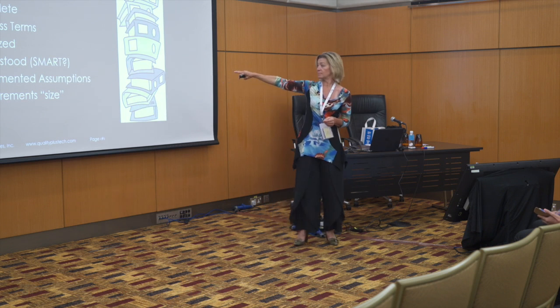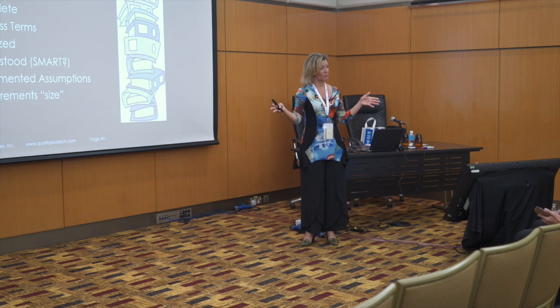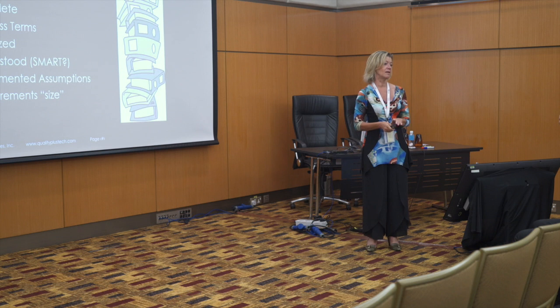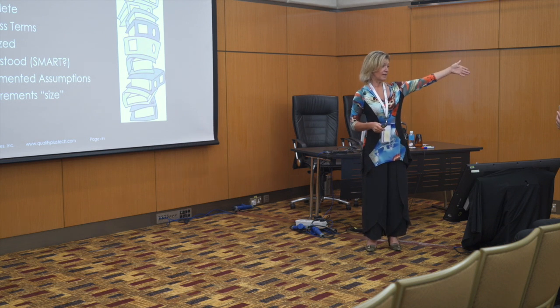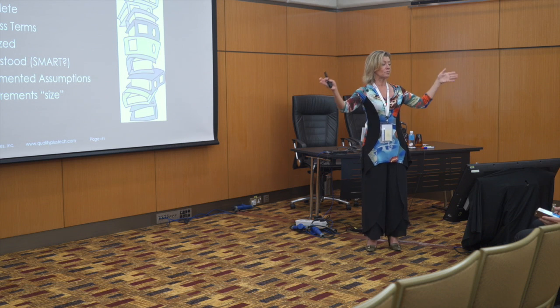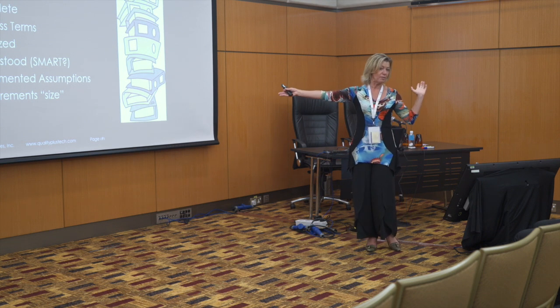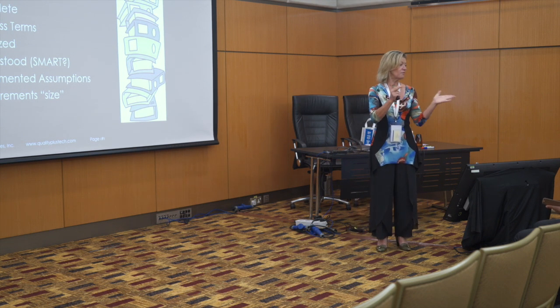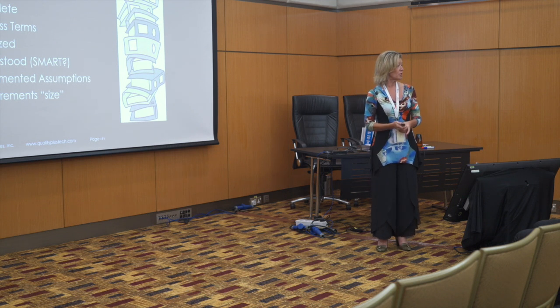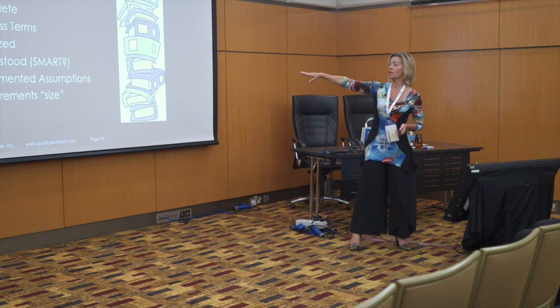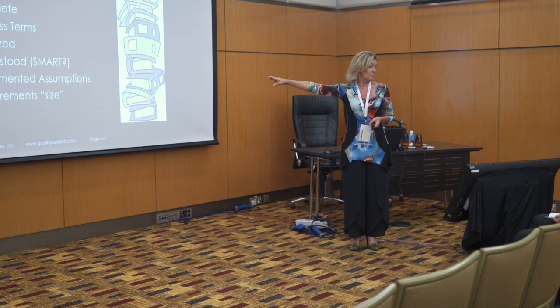I was on a software development project one time working with court reporters in a court system. So we had this word CASE, C-A-S-E, which to the police, a case was all of the charges that were brought against an individual associated with one incident. So say you've got a massive party. You might have 50 arrests, a bunch of different charges and things like that. To a policeman, that was a case. To a lawyer, a case meant something completely different. To a court reporter, that word case meant something completely different. So we had to document our assumptions so that we made sure that we had that.